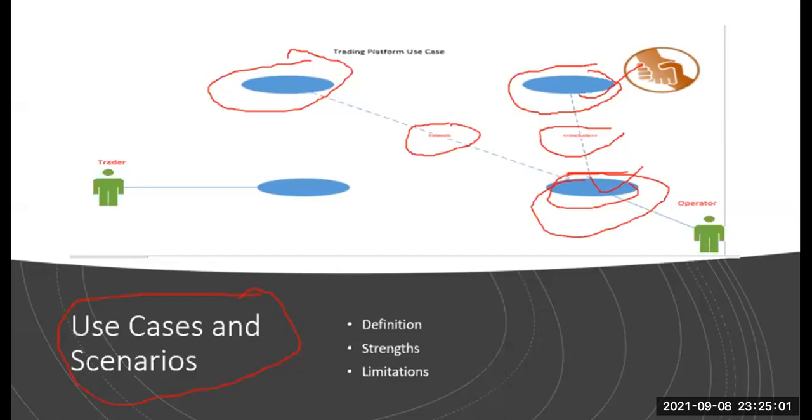But sometimes you may enter into fixed contracts with external vendors where you write very rigid acceptance criteria that are non-negotiable. That's when you may go and check, when your contracts include penalties and all of that, right? That's when you may go and check acceptance criteria. Normally Agile or Scrum is not very suitable for such fixed term contracts, but in reality it can happen that people charge penalties based on the acceptance criteria.